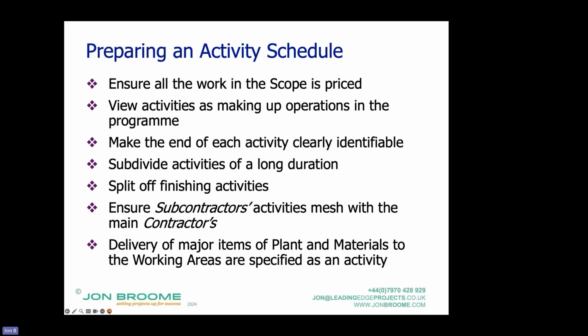So yeah, under professional services, for instance, there needs to be some, if you like, deliverable or something tangible which they can say, look, we have achieved this. So it might be first draft 2, or whatever. Or complete sections 1 to whatever of that report.